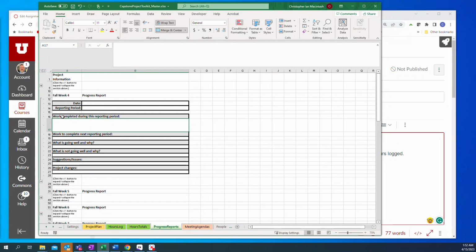And again, you'll see some basic questions. What did you do during this period? What do you have coming up? What's going well and why, and what's not going well and why? Any suggestions or issues, and any project changes that have happened.